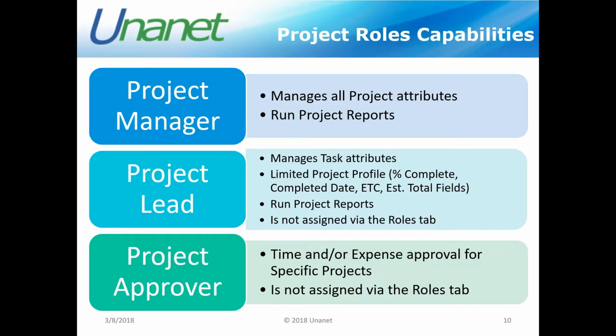So the project approver, this is if you wish to add that optional level of approval where you are going to approve time and or expense specifically for a project. And so that's also the reason that's something you have to go into the project and name that person distinctly at that point in time.